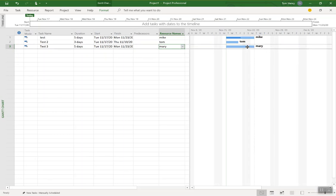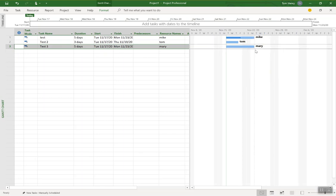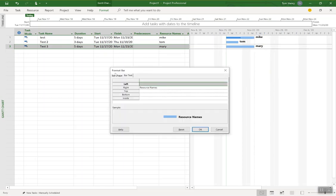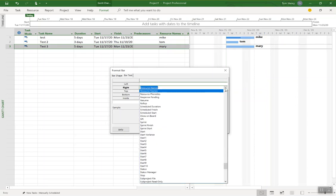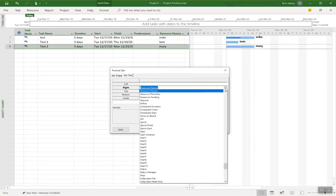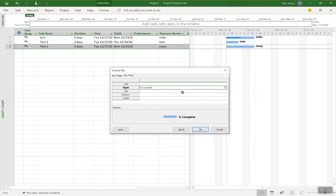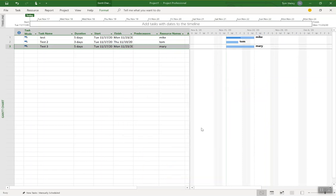Now, for any given task in the Gantt chart view, I can right click, click on the format bar and in here I can click on bar text and switch the resource names to show percent complete or any other column that I would like to see. So I can see just for that task, I'm seeing just the percent complete instead. Well, that's one way to do it.